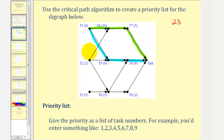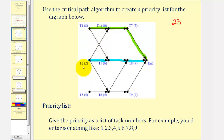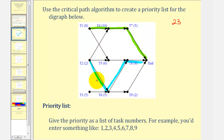In either case, notice how we would add task one to the priority list. Let's try some different paths from task two and three — we're looking for a path that has a total time of more than twenty-three hours. From task two to four to seven to the end has a total time of two plus ten plus five, that's only seventeen hours. From two to five to eight to the end, total time would be two plus six plus nine, or seventeen hours. From two to six to eight to the end, total time two plus five plus nine — sixteen, less than twenty-three.